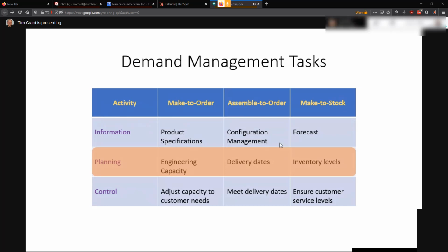Things to consider: will the company use forward scheduling to plan their scheduling, or backward scheduling to meet the client's expected date? The former uses available dates for all resources, while the latter is date-driven and allocates latest possible times for ordering, scheduling, and completion in each stage of the project. Does the company have adequate suppliers? Are the supplier lead times sufficient to meet each stage of the production? Is the right technical labor available to execute the needed assembly, or does it need to acquire specialists elsewhere to meet the contract?